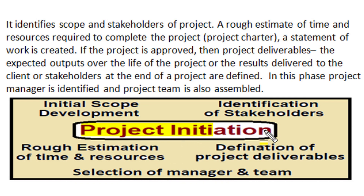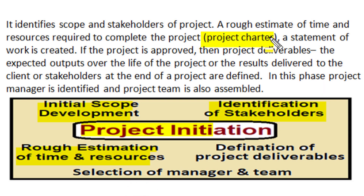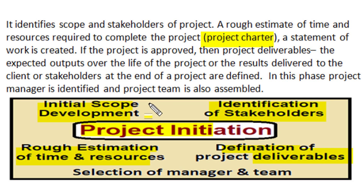In any project during the initial stage, the scope of the project is identified and prospective stakeholders to whom the project is designed are identified, and as per those stakeholders the project scope is developed. A rough estimation of time and resources to achieve the project goal is developed, and we popularly call it the project charter, which is basically a statement of all the works which a project has to perform. The project charter is approved by stakeholders, then project deliverables — the expected output over the life of successful completion of projects — are defined. The results to be delivered to the client or stakeholder at the end of the project are identified, and the project manager is selected and tentatively the project team is also formed.